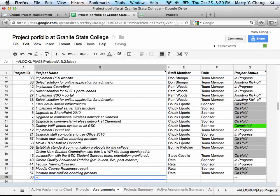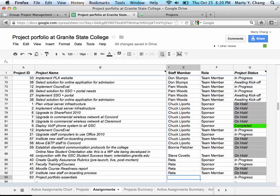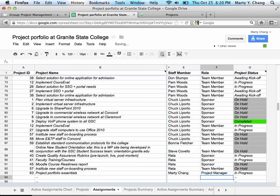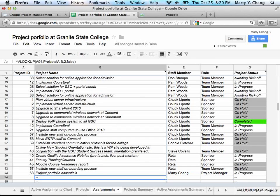What you notice once you put in 63 is that the project name automatically populates. Then you add the name of the person, which in this case is Marty Chang. Add the role, Project Manager. And again, you'll see the project status was automatically filled in.